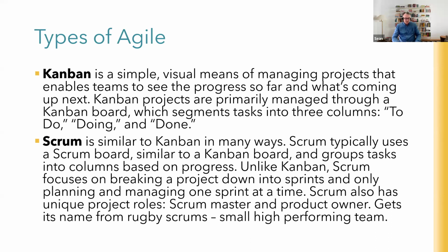Kanban is just a particular approach. Projects are managed through the Kanban board. And the whole point of a Kanban board, and it bothers me when I see them on computer screens, is that it's supposed to be a massive, big, easy-to-see visual representation that anybody could walk past, and in the time they walk past it, get all the information about what the team was doing and where particular activities or user stories are at. Putting it onto a computer screen takes that away, because one of the functions is supposed to be on a big wall somewhere.